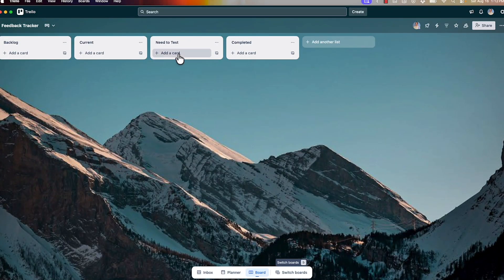You can also use Trello as a Kanban board to track feedback. When I worked at Amazon, I had to go on-site to fulfillment centers to test my course on the devices where associates would be taking the courses. These devices did not allow you to record anything, so as I was going through my Storyline course, I needed a way to capture and keep track of things that were not working or needed editing. So I set up a feedback tracker — I'd capture anything on my phone, and when I was ready to start working on it, I'd move it over to current, then to need to test, then completed.